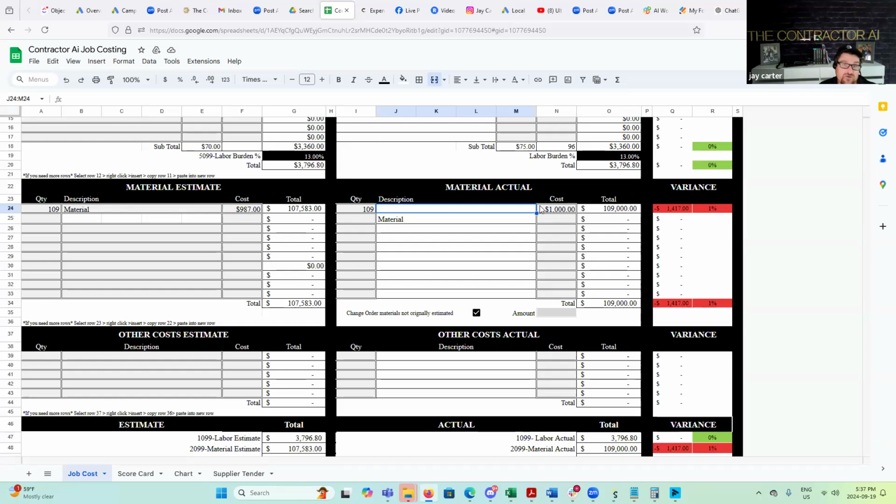They work on razor thin margins, higher volumes. So the guy that's just coming in infrequently, or just ordering from the desk, is paying full pop price. Now the guy that's a little bit smarter is locking in and using a purchase order, confirming pricing and getting competitive pricing. He's the guy that's going to get the better deals long term. It's also a better way to bargain or to work with your supplier.